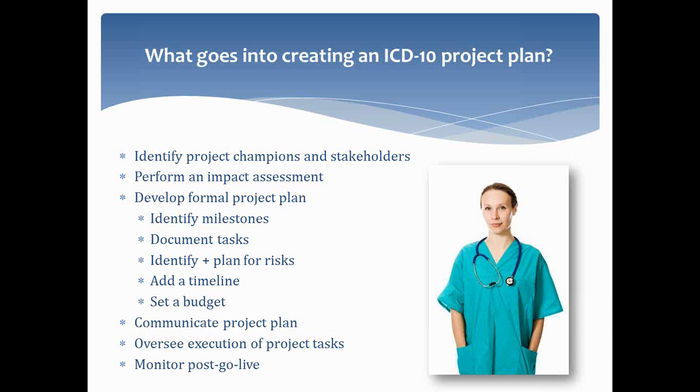Another thing with the project plan is once you have your tasks and your risks identified, add a timeline to your project. So, starting today, your first milestone is identifying your milestones. So put a date to that. Say you want to identify your milestones by next week, and put a date by that. And then for each of your milestones, put a major date attached to those. And then as you fill in your tasks, put dates in there for your tasks as well. But you want to make sure that you're realistic about your timing, and put realistic dates behind those.